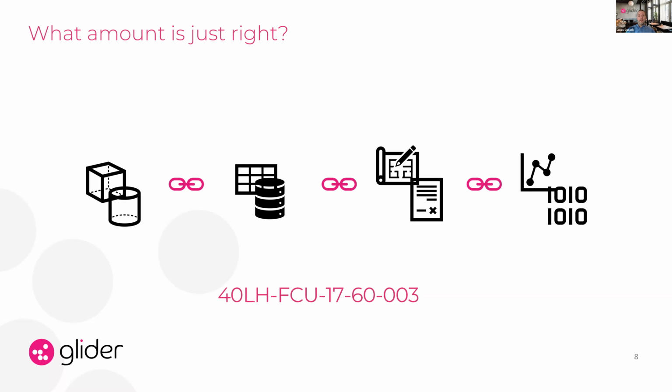Other things like who made it, who installed it, when its warranty expires, they're useful. But if you're limited in what you can realistically pull from your supply chain, just enforce the unique ID. If you think that's overly simple, then I can tell you I've never actually seen it done 100% correct in my career.